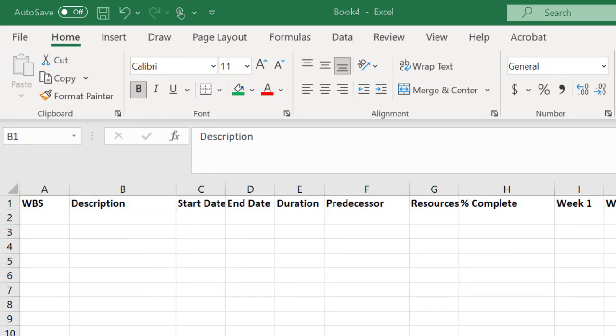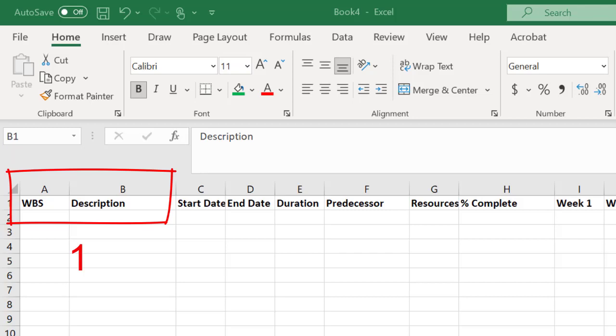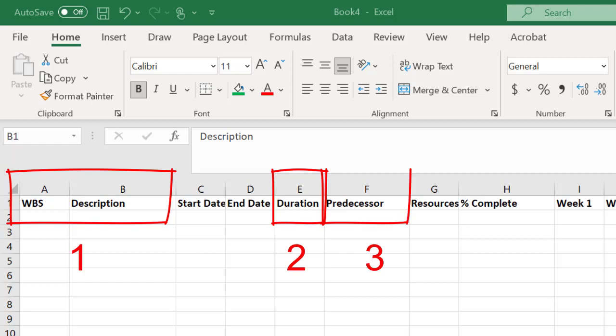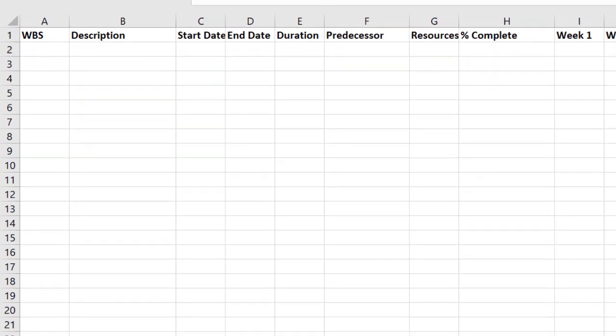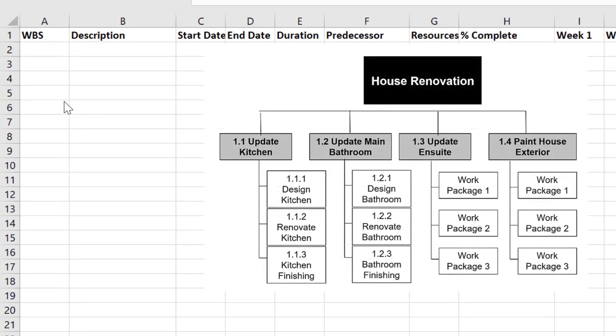So in order to build your Gantt chart you need to follow a particular order. In step one you complete columns A and B which is the work breakdown structure coding and the description. So you only do columns A and B then you go to column E and do the durations and do all of the durations and then go to the predecessor column and do all of the predecessors. Once you have the duration and predecessor done you can then go to the start date and end date. It's a lot simpler. We are using a work breakdown structure as the basis for the Gantt chart. You should always do that. So I'm going to enter some data and we're going to see how it works.